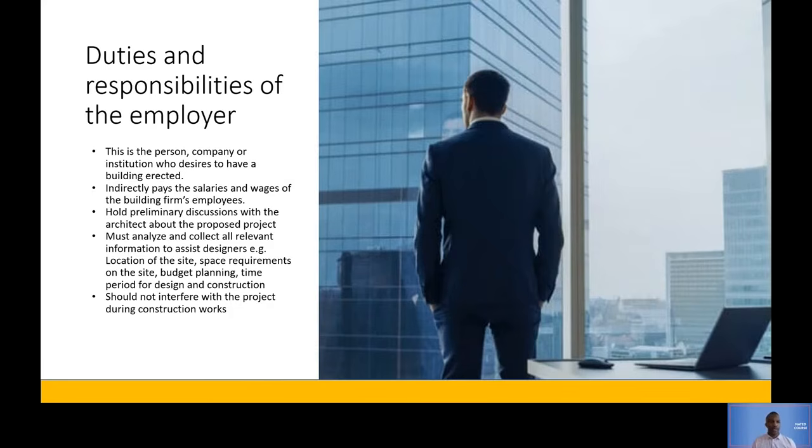Another responsibility of the employer is that he must analyze and collect all relevant information to assist the designers. So when he approaches the architect, he must tell him where the location of the site is. For example, if Menlyn must be built, the location is in Pretoria, in Pretoria East, specifically in a place called so and so, with coordinates and all of that.